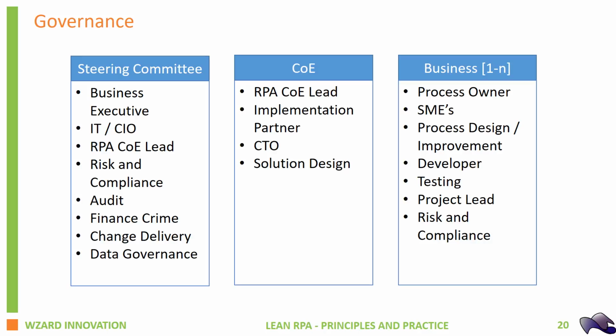Now, you may decide to put a steering committee in place right at the beginning, before you even begin your pilot. And that's fine. If it's a strategic piece of work, then actually starting to establish the levels of understanding and ownership from all areas of the company is important. But if your pilot is just to test out some of the ideas that you're not sure whether you're going to progress or not, onto what level, then perhaps the steering committee is something that you only put in place once the pilot is successful and you decide now is the right time to scale up.